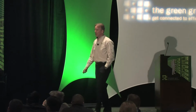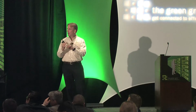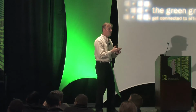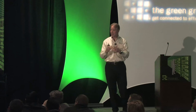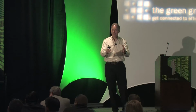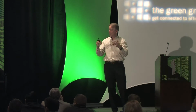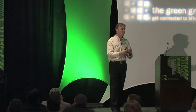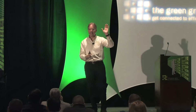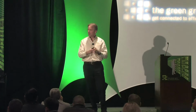Okay? Next one, PUE is the design driver. We went back and aligned both our design team and our construction team. Then we pulled in the operations team, the ones that run the data center, along with my team leading it, and said, this is what we're going to go after. How do we design this? And it's not just about how the guy can design it, it's how they build it and how they run it. That alignment was awesome. That is really powerful when you have the right people in the room making decisions together and raising their hand and saying, that's not really how it operates when you actually hand it over to me. So we get the alignment from there.